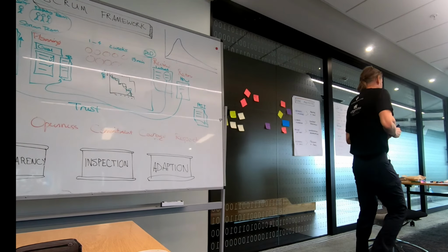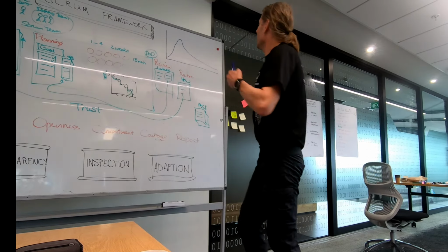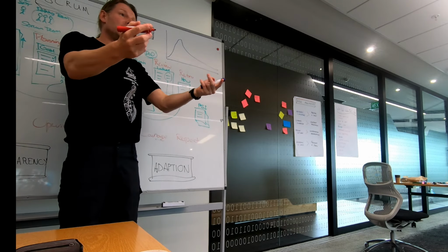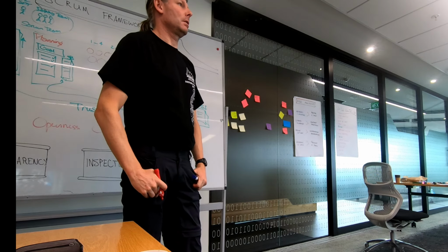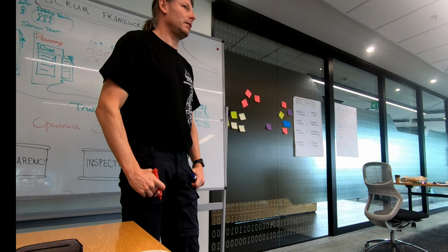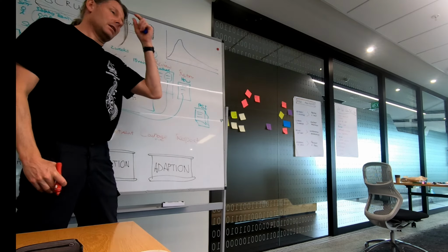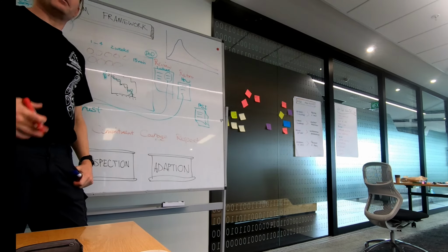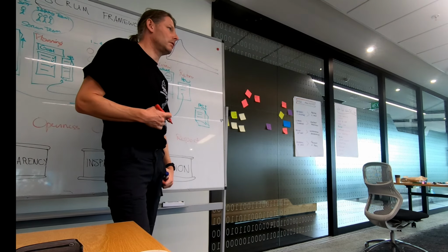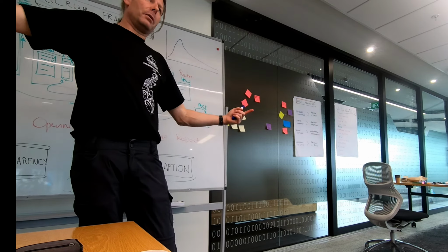Now, here's the other issue as well, and this is the old school project management way of thinking. So I used to be a PM, and I've got to plan the work, and I go and speak to the developer, and he goes, well, it's going to be 2 days worth of work. But I know if I say 2 days, he's going to be tapping me on the shoulder in 2 days. So I'm going to make it a week. Now, I'm the project manager, I put it on my plan, and I go, well, he says a week, but I know he's always late, so I'm going to make it a week and a half. Then my boss comes to me, and we all pad it out, it's called buffering.